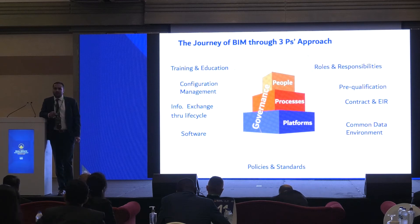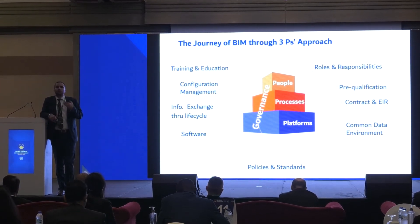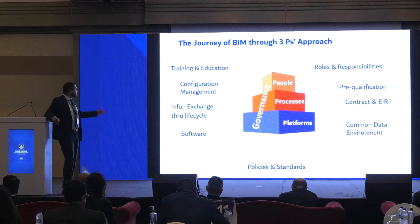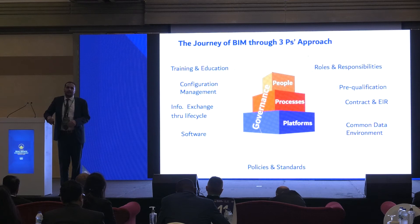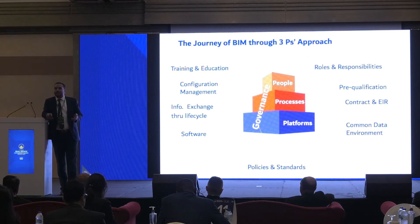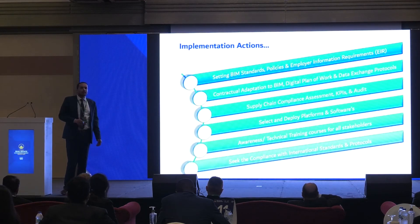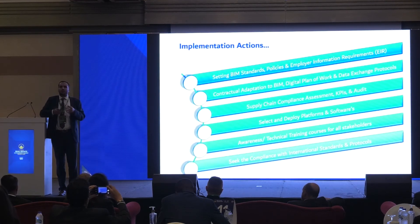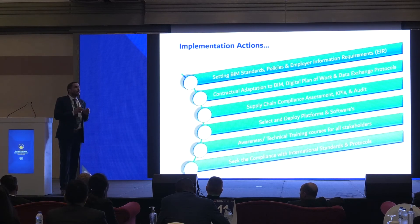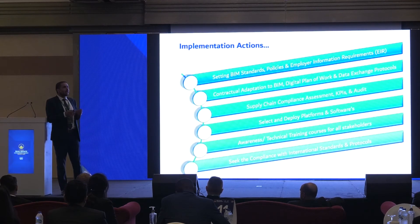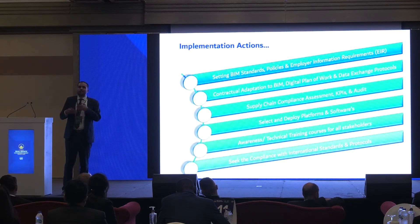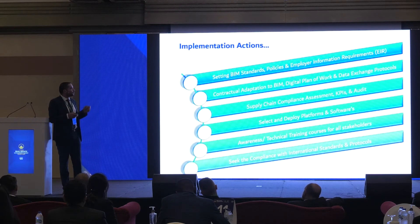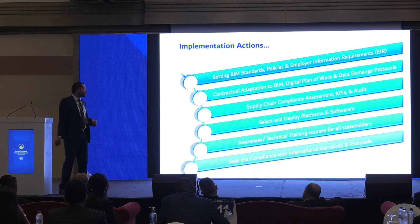There is an important document called the EIR — the Employer Information Requirements. You need, as an employer or client, to prepare this document to show your supply chain exactly what you are looking for. For platforms, you need to select capable software that can support your project, industry, or discipline. Also, the Common Data Environment — the CDE — is the environment where all the information will be centralized and everybody can refer back to it, referring to the same information. The versioning and changes in documentation related to the project can be found in one place. This is the single source of truth needed for BIM.